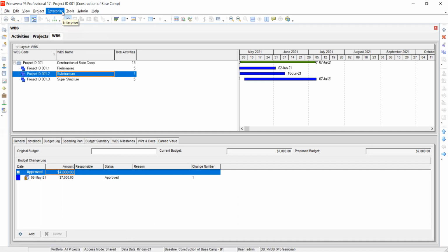For resources, remember, this is budgets. Just imagine you're on a project, then the budgets are getting dispersed on different levels. It's not about the resource. Remember, for a resource, you enter the standard rate, or how much that resource is going to charge you, per hour or per day. If it is a person, how much are they earning per day?